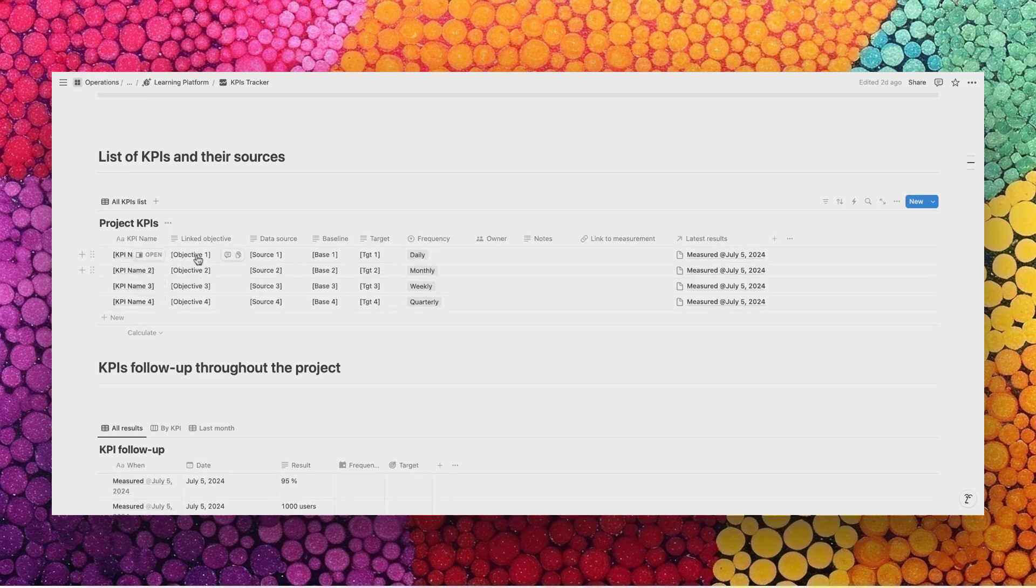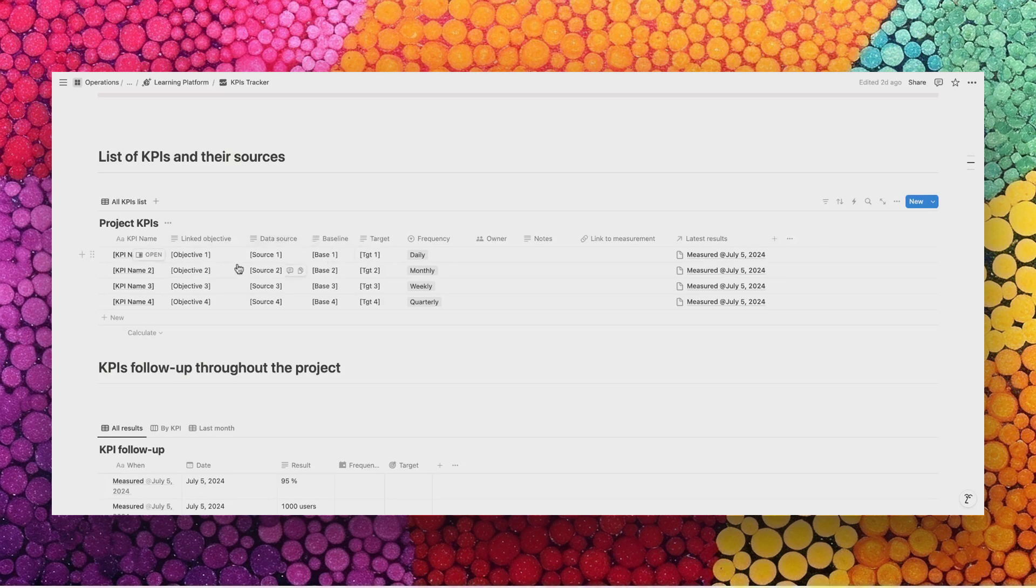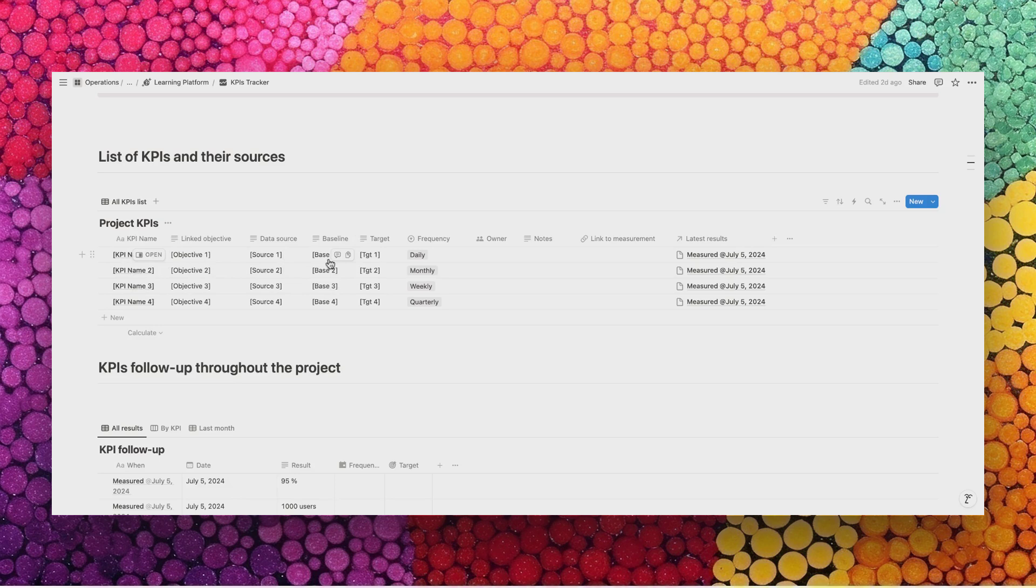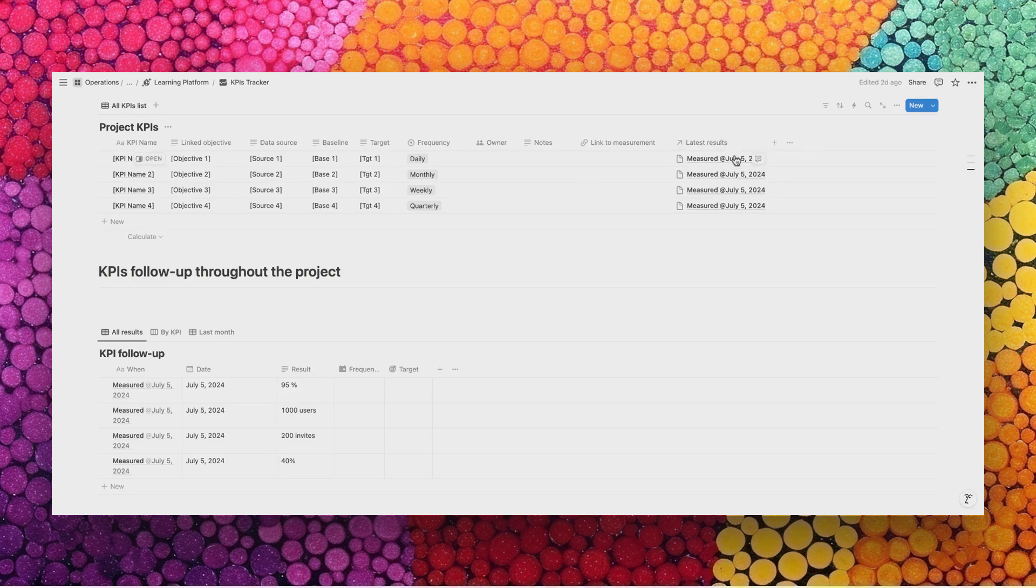Start by defining the KPIs at the beginning of the project. You might have noticed that I've only used text-based properties for the KPIs. The reason is very practical. Since you can have different measurement types, like percentages, currency, or another measure, it's easier to initially set them up as text and simplify your work. You will also find linked the latest results for each KPI, which you will fill in throughout the project. You set them up in the beginning and then you measure regularly, for example, every month.